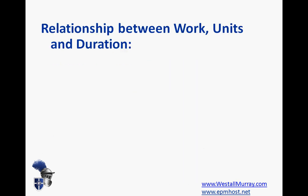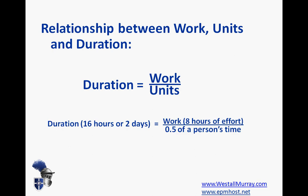The relationship between those three concepts is represented in a core formula within Microsoft Project: Duration equals Work divided by Units. To illustrate with actual numbers — in our example, there are eight hours of work to review a document. If we have someone spend half of their available time on it, then of course it's going to take two days, or 16 hours.